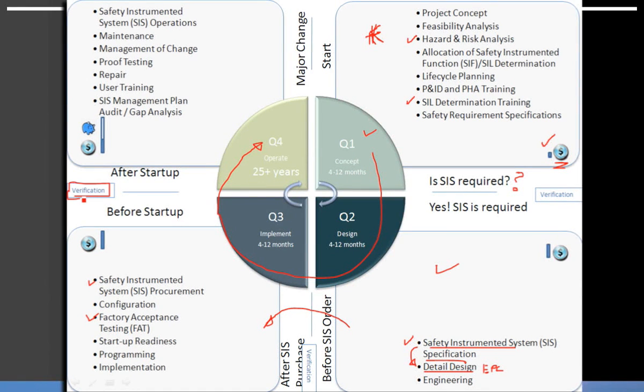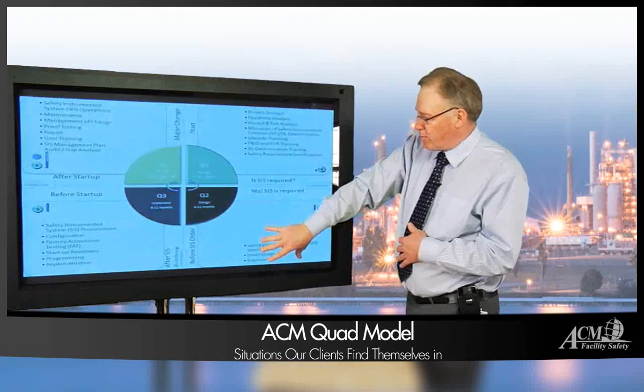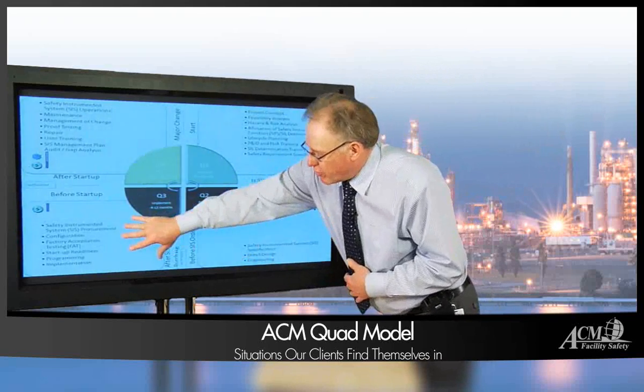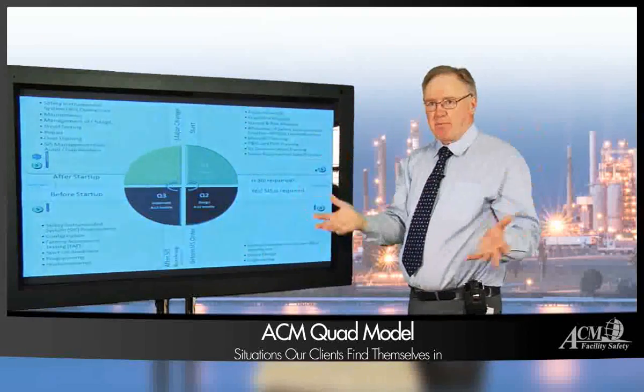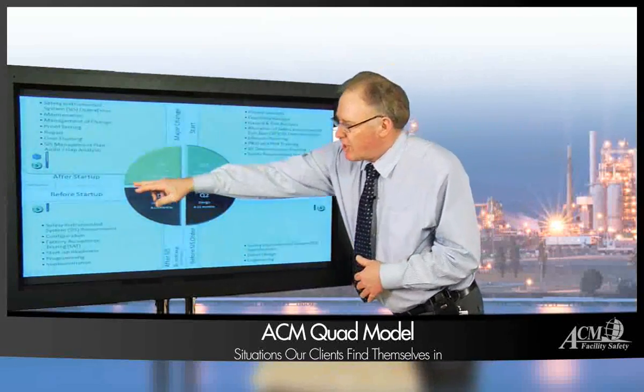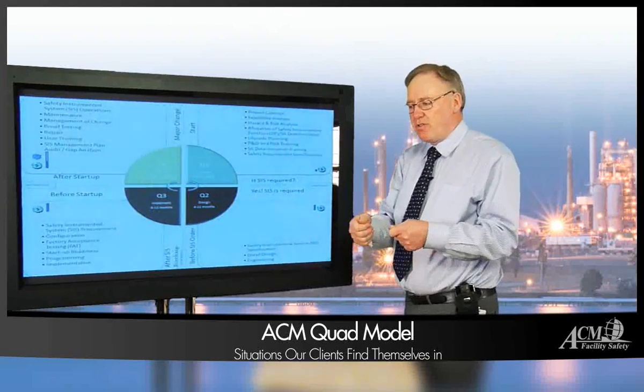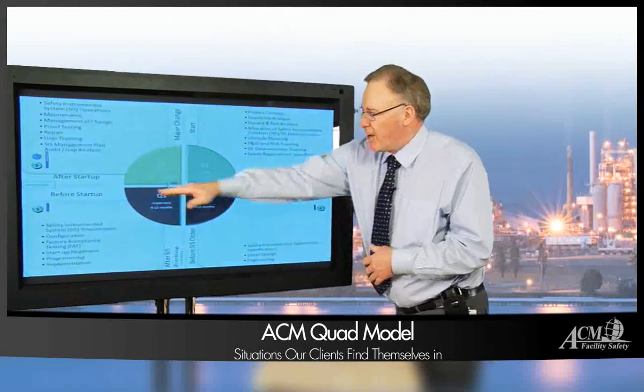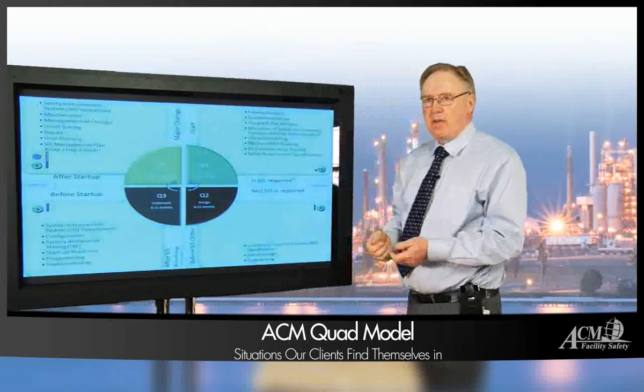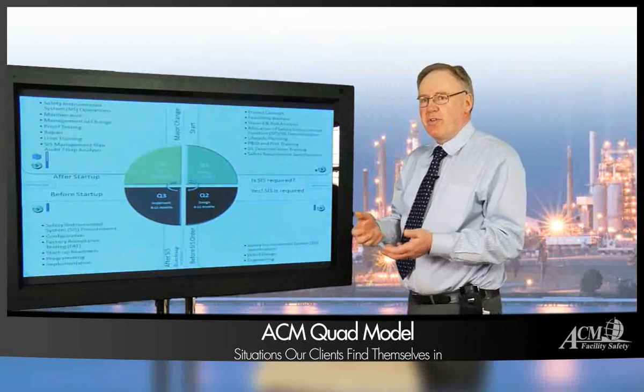I think the biggest step we have to play is this verification step, where we basically verify that the clients or the third parties that have been used to complete quadrant 2 and perform quadrant 3 are basically complete. So we use a set of checklists, and we would actually go through and examine the procedures they used and make sure that all the outputs out of this quadrant were met. So we need some documentation to review.